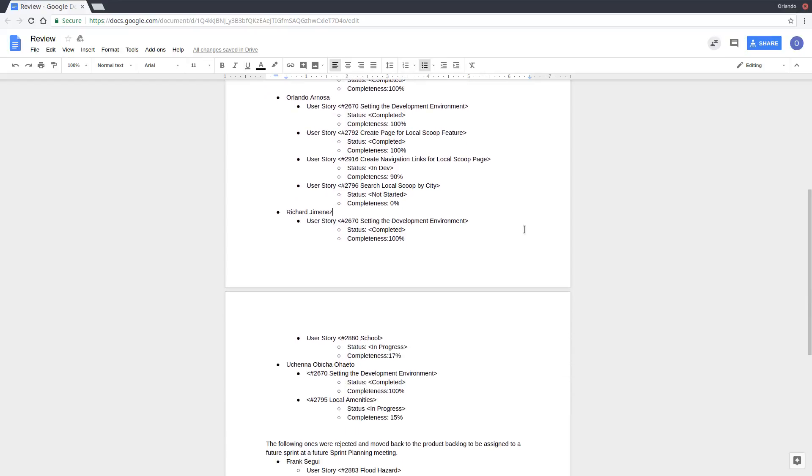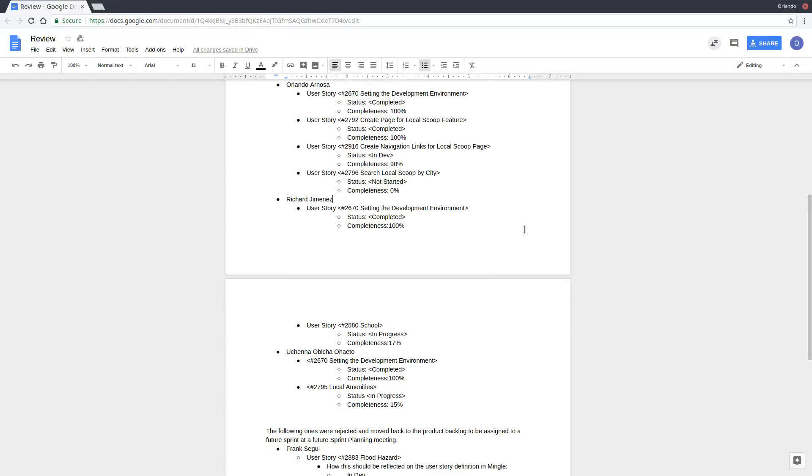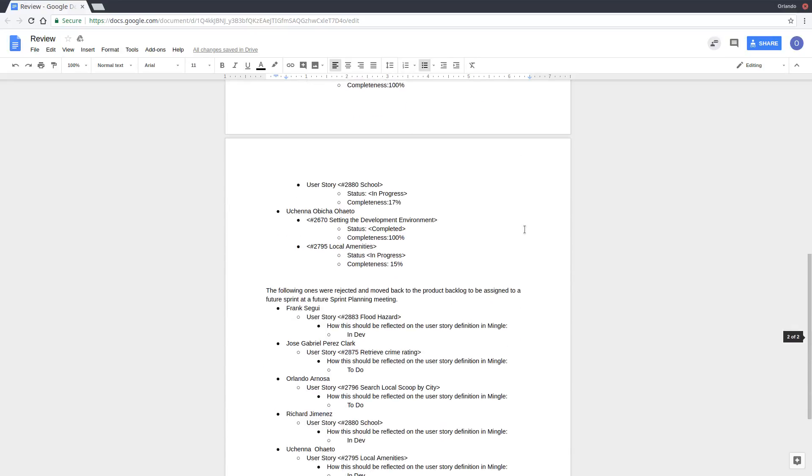Richard was working on UserStory 2880, which is to view the schools. It is still in development, will be carried over, and it is about 17% complete.